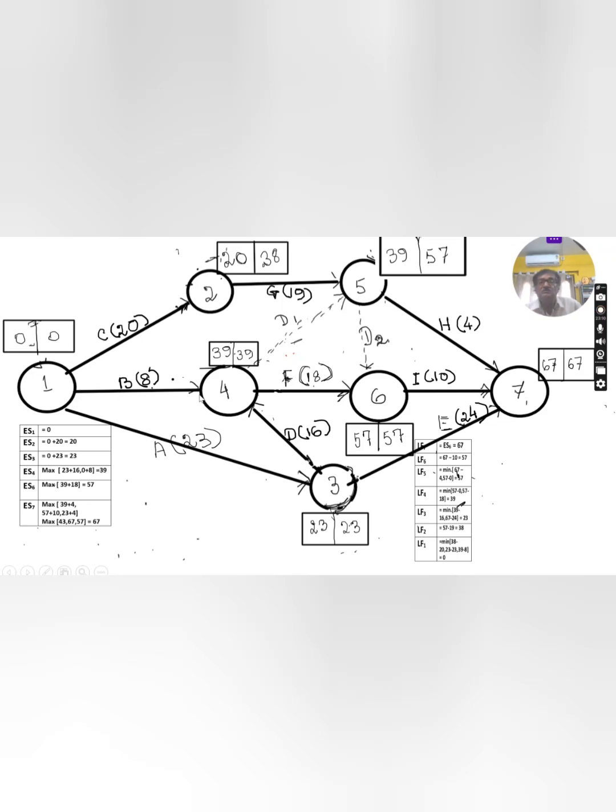If you take this path, latest finish time is 39. 8 days are required to complete this. So it is equal to 31. And if you take this path 1, 3, then 23 is the latest finish time minus activity time 23 is 0. So out of the three, minimum is 0. That's why it is 0. So this process is over. This part of computation, earliest start time and latest finish time, is over.